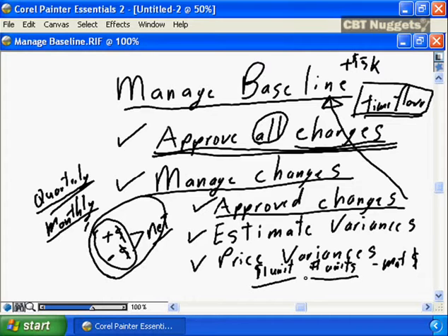But it's your job as a project manager to ensure that you're managing all of these price variances for materials and supplies. You understand the difference. Again, you accumulate them on the appropriate basis, probably monthly for short duration projects, probably quarterly for longer duration projects, and then you work with management to decide, what are we going to do about it? Are we going to accept the budget overrun? Are we going to change the scope, the functionality, to try to deliver within the original costs with less function? Maybe changing the timeline again can help you give budget relief.